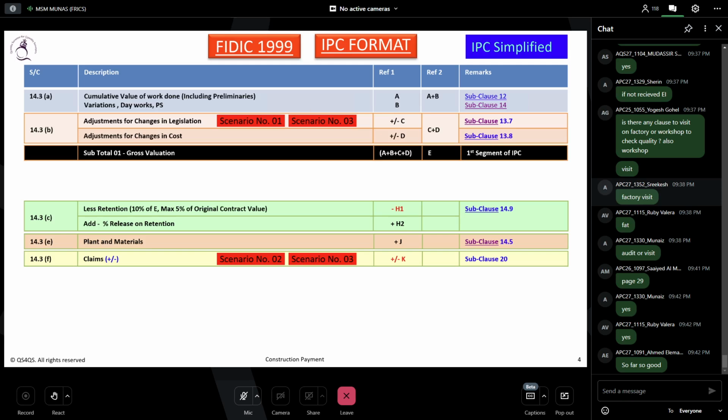It's not like that. See, the initial test and commissioning, both parties price them, right? Either contractor or consultant, they price that item. So there's no problem. Let's say that the initial test failed. Now it is contractor default, so the contractor will incur his cost because he can't claim, it is his fault. But now the engineer will also come and do the retesting. They have to allocate time, so there may be some delays to the project. The engineer will be paid by the employer. So how is he going to recover this cost? This kind of thing becomes an employer claim.